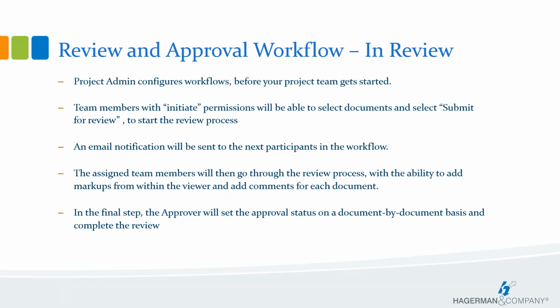So again, that project admin, when they're making these review templates, is designating who can be an initiator and who can be a reviewer. Additional members can be added to be notified of the review process, but that's only to keep them in the loop. They cannot add someone to be a reviewer. Only the project admin can do that within the review template.